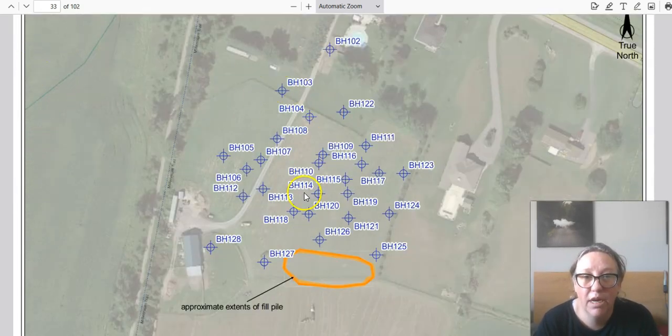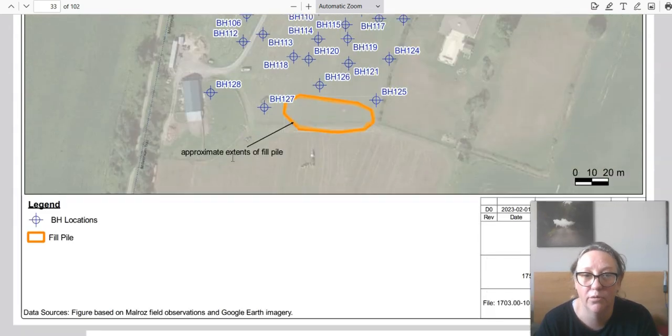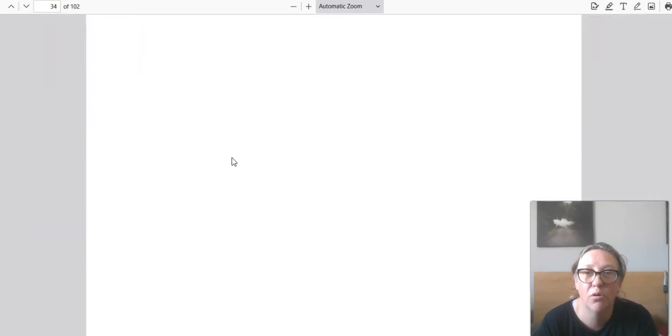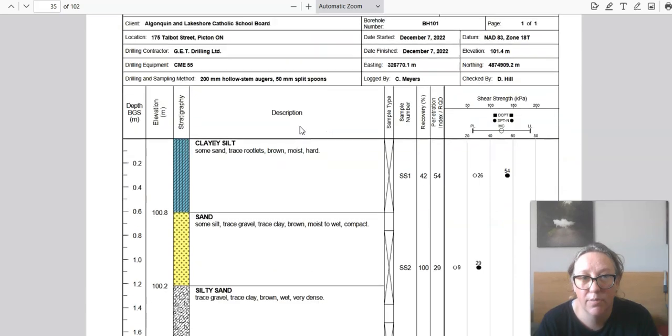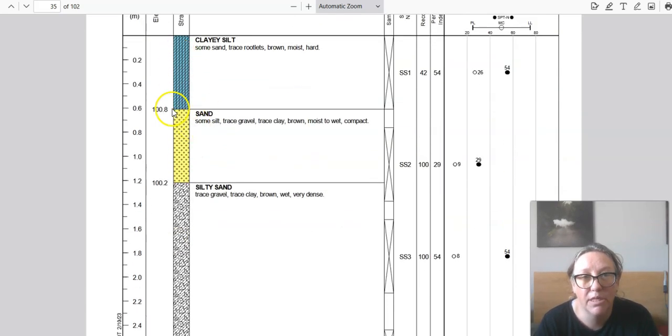And then this is what really is quite helpful as well, because every single borehole that they've drilled on a particular site, they will tell you and show you where it is. So you can say, okay, my fence line is along here, and those holes have hard rock at 2 feet below ground level or whatever, so you know what you're going to be in for when you get there. And this is what the tables look like that you very often see in bid documents, and it'll have a graphic representation of what is expected underground on that particular site.